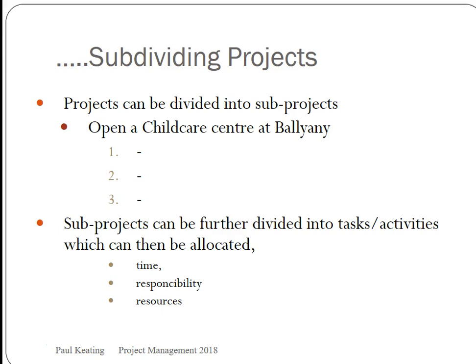Okay, so if you want to subdivide a project down, you can subdivide it into a number of headings. Each project can be broken into sub-projects. An example might be that you would be looking to open a childcare facility or a youth work facility, and in order to do that there are a number of sub-projects that need to happen.